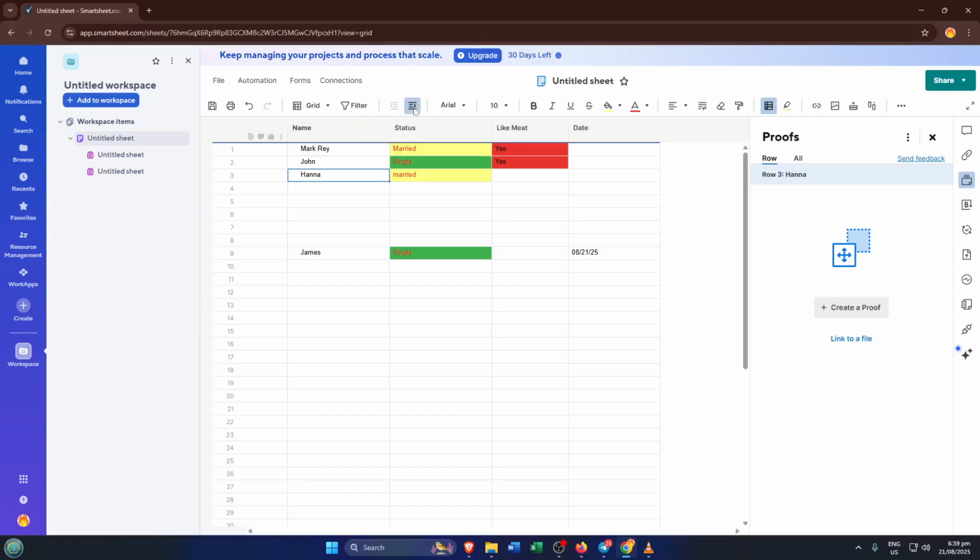If your sheet is set up to summarize data, indenting can even help create parent-child relationships, like turning your phase 1 into a parent task, and each step in that phase into neatly indented subtasks underneath. Don't worry if you need to undo a mistake. You can always outdent by clicking the left arrow button and your sheet will adjust instantly.